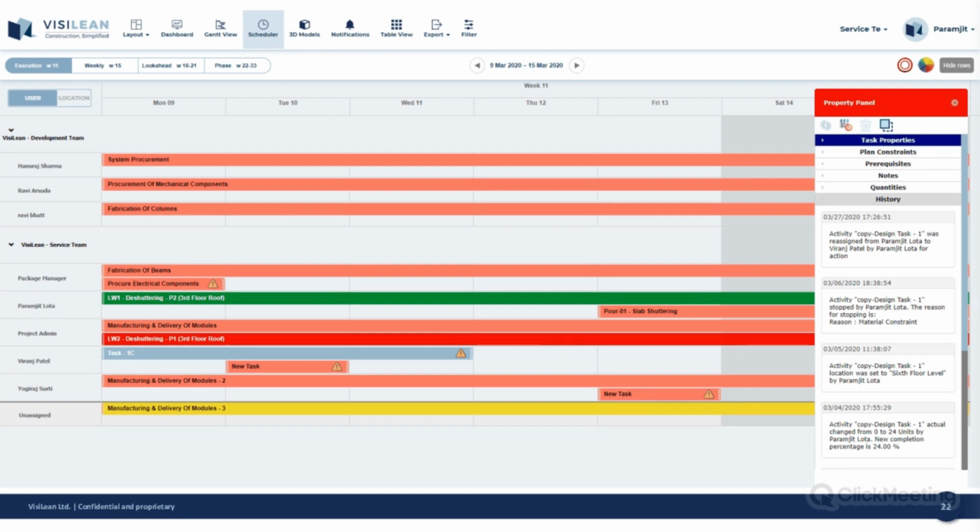So this is what we call our scheduler. This is a look-ahead plan, basically. You've got the current week, next week, 3 weeks ahead, 3 months ahead, and the last two can be configured to however you want them. We convert that plan that you either imported or created into us into these digital sticky notes you can see here. Once they're imported, they'll appear at the bottom, and they'll all be unassigned. And the idea is you work your way back from the furthest period, assigning tasks.